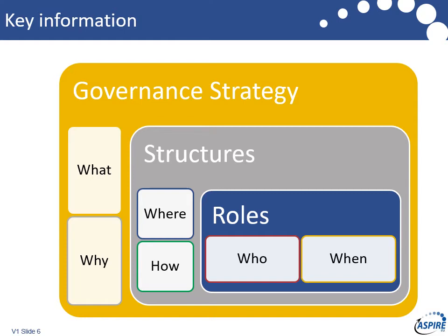Then you've got to think about the organizational structures and reporting lines. We talked about the kind of program hierarchy. PRINCE2 has one, APM has one. You need to actually put your organizational breakdown structure together to show how all the various committees and roles and working groups fit together and how information flows through them.